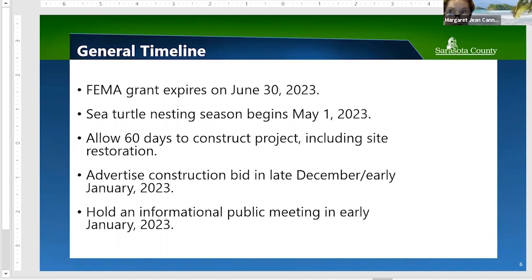Question: Is the $370,000 spent on engineering a couple months ago part of what the state or tourist district would be reimbursed to the county? That's part of what FEMA and the state grant program will reimburse. The bottom line is that traditional county general fund coffers are spending nothing on this — we will spend some tourist development tax money, but the assessment district won't be charged.